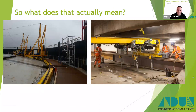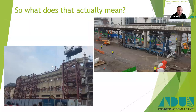Assessment of the existing structure for a rolling gantry crane, design of the gantry beams and crane rails, assessment of the structure as it was demolished, design of the frame rails, assessment of the structure in the temporary condition, access ways. Then fairly obvious temporary works: propping, working platforms, temporary stability of the structure, propping and support systems, and a facade retention scheme.